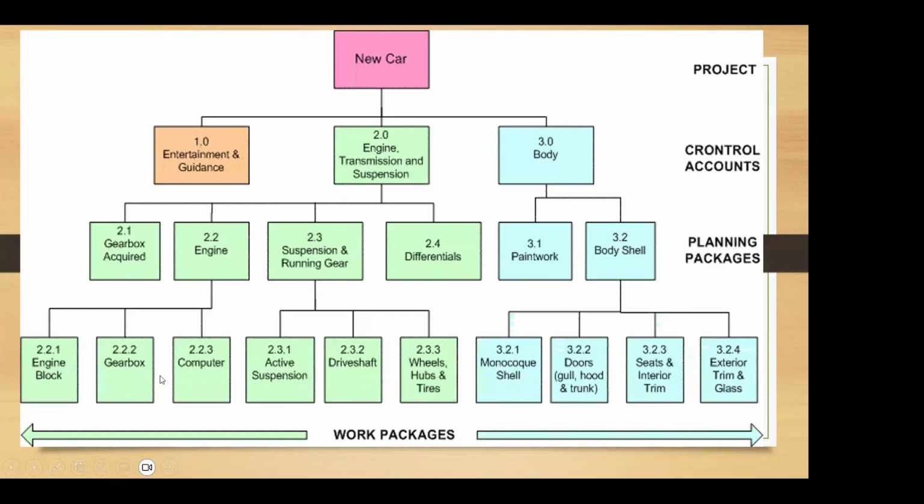So these are the work packages. This is what we call the work packages. Okay, so the top one, the one above, these are called planning packages. The lowest level is what we call the work packages.